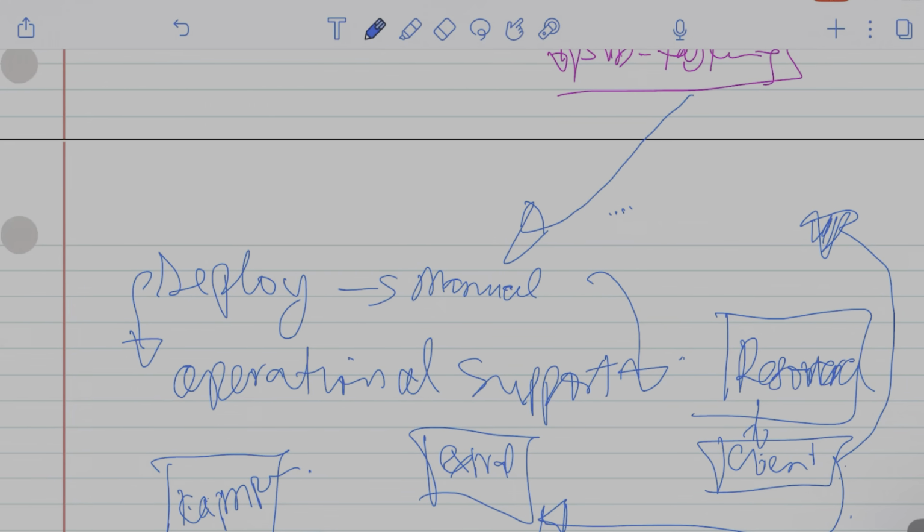Now, the reason why releases most often are planned to happen during the weekend or during non-working hours is because we might need to put a lot of activity on hold within the organization. We freeze so many parts of the process so that it does not affect what is going on. So that's the best possible time. Or during a holiday, we can plan to release.